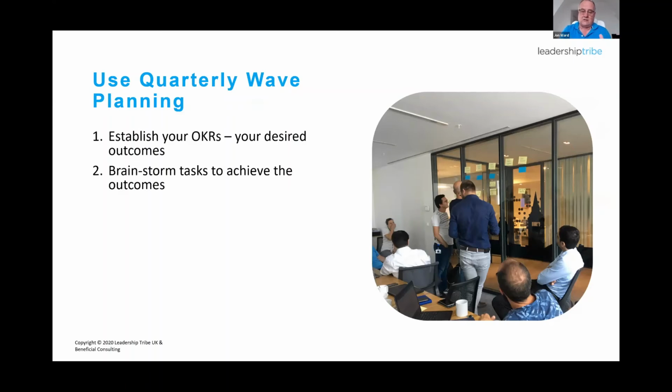So 6 months difference. So don't think that you're going to change an organization overnight. When you're talking about values, beliefs, processes, we need to take time to do that. Don't forget the processes, some of the processes stop the teams from being agile. So anytime you get a review and approval process, you're stopping a team being agile unless that review and approval process can be adapted to take incremental delivery of the deliverables that they're approving or reviewing.